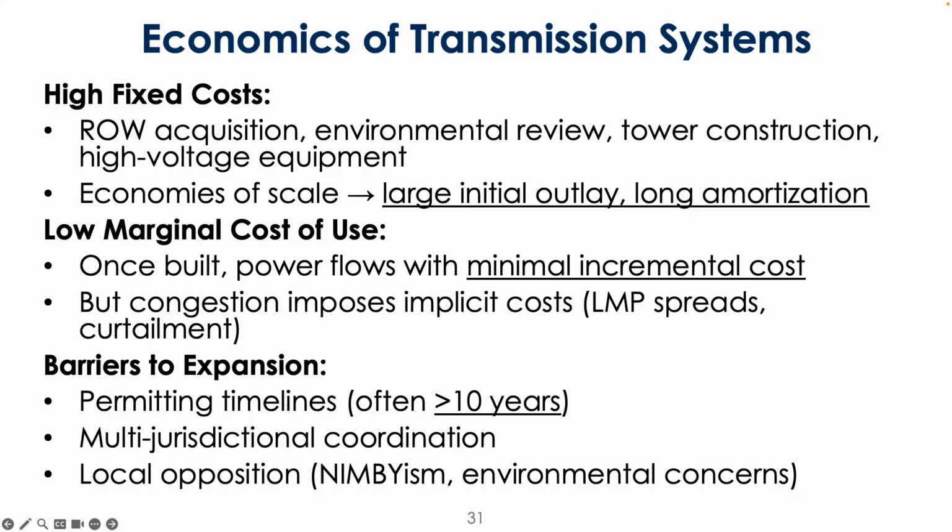As far as barriers, right? So the permitting and getting those rights of way might take a very long time. You have to coordinate across many jurisdictions, right? And then you might run into local opposition through NIMBYism. That's like, not in my backyard. I don't want to see this big transmission tower. And then you might have issues environmentally. Oh, are you going to be affecting the local environment in certain ways? Maybe you're planning to build this tower, but it's the site of like an endangered species or something. Yeah, so these are all barriers to getting the stuff up and running.